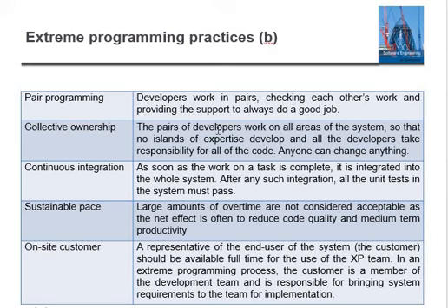So once we are done with the login module, we will integrate it with the system. Then let's say we started with the user module. When we complete the user module, we will integrate it with the login module. Then we have developed the product module. When the product module is done, we will integrate it with the system. So there will be a continuous integration system.